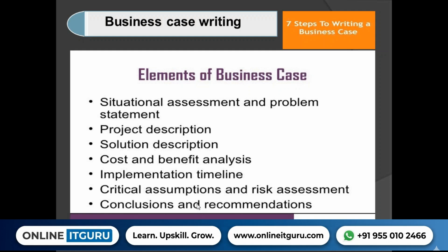Okay. So after identifying the stakeholders, we are going to prepare the stakeholders list and the stakeholder summary. Now, what is the stakeholders list and stakeholder summary? After identifying the stakeholders, we are going to prepare a list. Okay, we need to meet this number of stakeholders. That means if you specified a figure, let us say we need to meet 15 stakeholders, we are going to put each and every detail. This stakeholder is this one, and this stakeholder is this one. That is nothing but the listing of stakeholders. Now, stakeholder summary is, out of these 15 stakeholders, how many you have met and what kind of information you have gathered. That is nothing but the stakeholder summary.